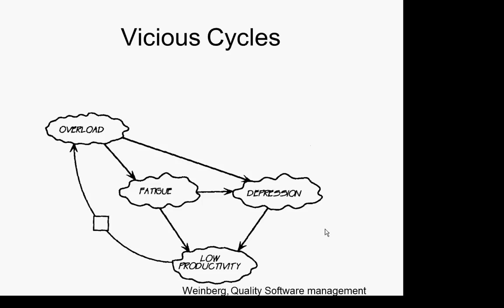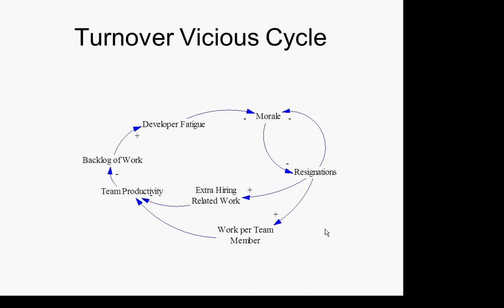Turnover: if there's a backlog of work it leads to greater developer fatigue and greater developer hours, which lowers morale. Morale leads to resignations, which lower morale as well. Resignations lead to greater work per team member, which tends to lower team productivity — people are thrashing, switching between tasks rather than keeping a rhythm — and that leads to a worse backlog of work. Is this a reinforcing or balancing loop? It's a reinforcing feedback — in this case a vicious cycle: morale goes south, resignations increase, which drives morale even lower.